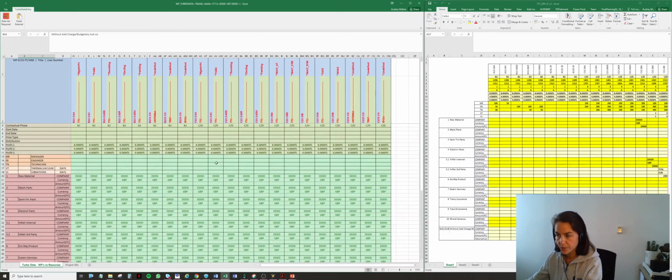So you see basically this structure follows the data entry that we've been performing before. And if we fill in the green cells the proper way, then we will be able in ECOS to directly retrieve all of this data instead of going to the cost tab and filling it everything one by one.